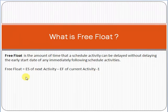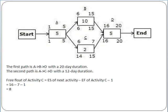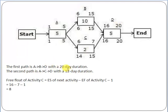The formula for free float is: ES (Early Start) of the next activity, minus EF (Early Finish) of the current activity, minus 1. Looking at this network diagram, there are two paths: path A-B-D with a total duration of 20 days, and path A-C-D with a total duration of 12 days. Since A-B-D is the longest duration, it is the critical path.